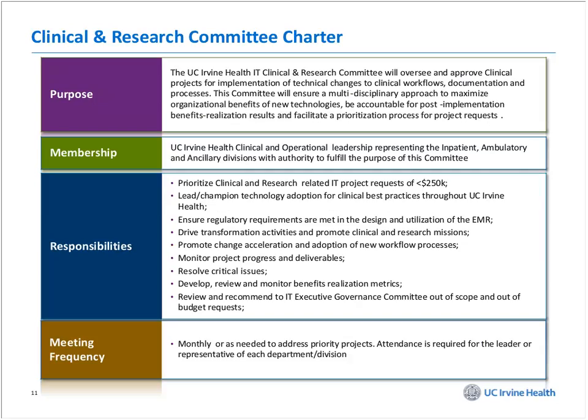You can see when we get to the membership, it's clinical and operational leadership representing certain areas. We have them deal with less than $250,000 requests, so they can handle that within the functional committee. They ensure the regulatory requirements. We keep that at that level. Transformation activities that are going on within your organization, you may have a lot of Six Sigma projects and things like that. We want those to be managed at the functional level.